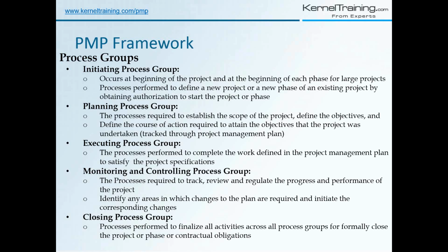All right. Now, the next process group is the planning process group. Now, where do you do all the planning? So input will be obviously your project charter, which is the basic document, which is having high level scope, high level schedule, cost. All those are defined. Constraints, risks are defined in the project charter. Those are input to the planning process group, where you go into detailed planning, where you come up with your detailed scope.